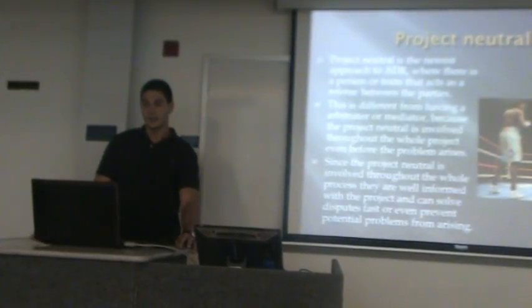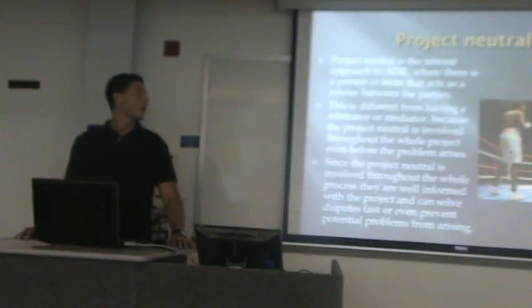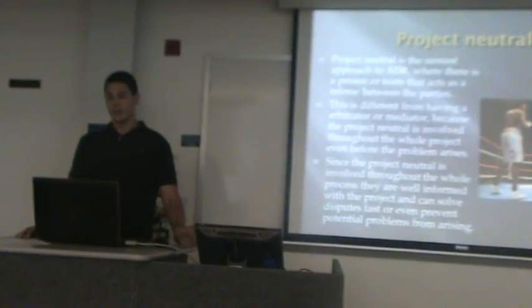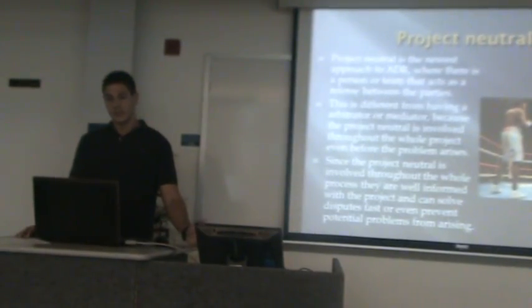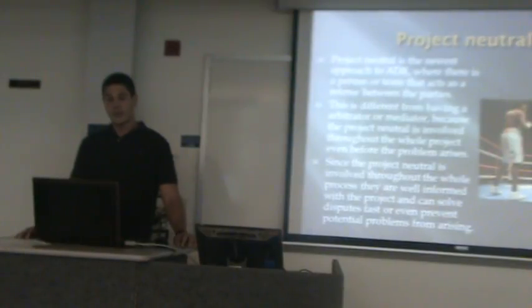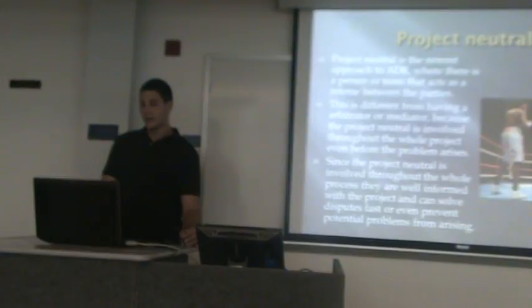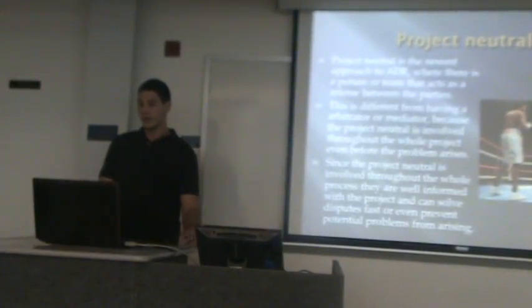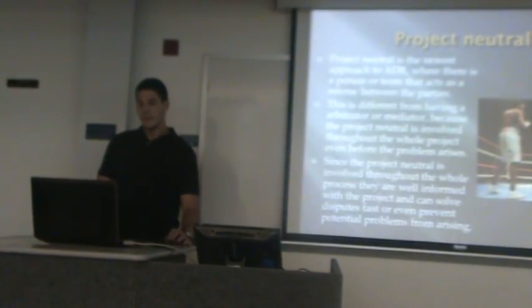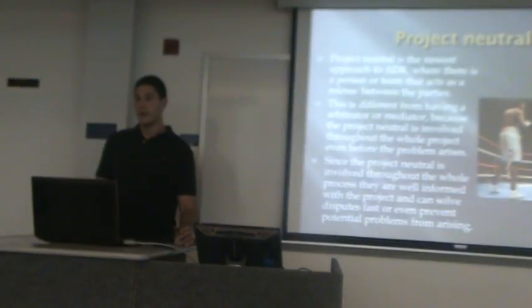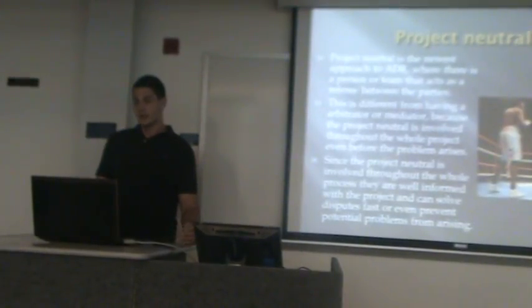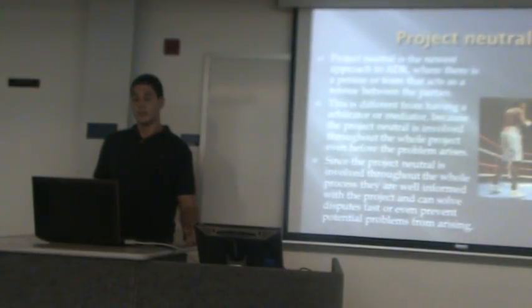Then project neutral is the newest approach to ADR, where there's a third person in the mix or a team that acts as a referee between the parties. The difference between having this project neutral and an arbitrator or mediator is that the project neutral is involved throughout the whole project. He doesn't just come along when there's a problem or a possible dispute.